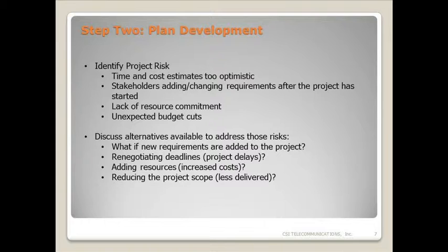Bill and I talked a lot about project risks, and this is really something that you should be doing with your project team. And a risk is any event that's going to impact your project, be it positively or negatively. And if you can collectively sit down and identify ahead of time what those risks are and identify potential strategies to resolve or address those risks should they occur, you're going to save yourself a lot of stress, a lot of heartache, and a lot of time down the road. And particularly if you can, at the front of your project, let your sponsors know, and this could just be through an email, these are what identified risks are, and these are what our strategies are going to be to address them.